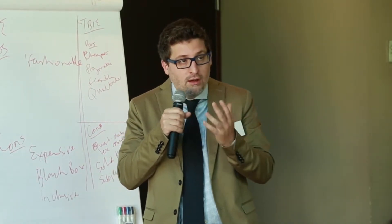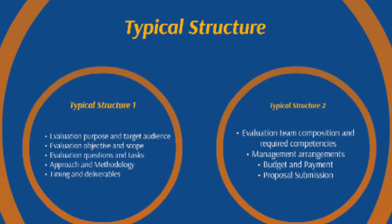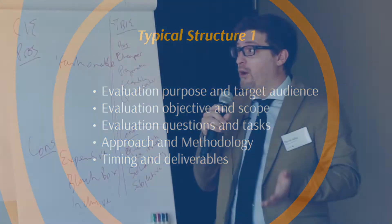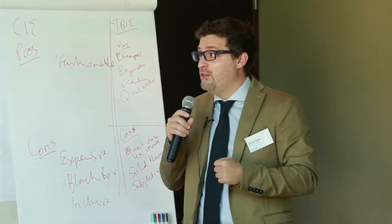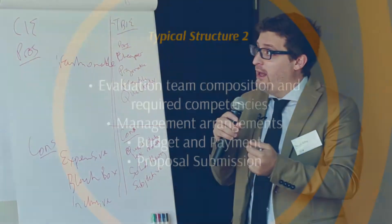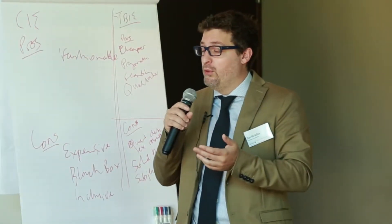What are the attributes which enable you to select the right evaluator? There is a typical structure — and of course you can use any structure you want. In our typical structure you begin with the evaluation purpose and the audience, then the objectives, the questions, the approach, the methodology, the timing of deliverables, the team composition, the management arrangements, the budget and payment, and how the proposal can be submitted.